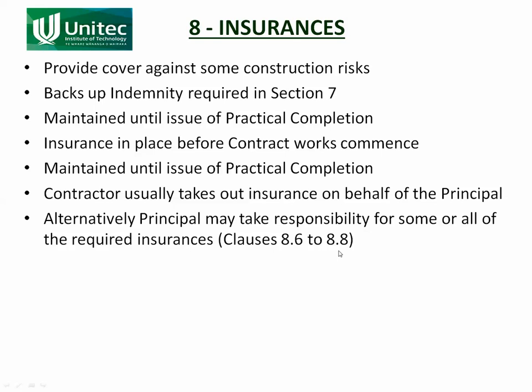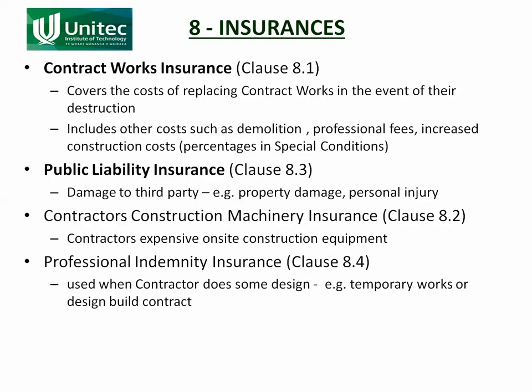NZS 3910 can be written so that the principal takes out the insurances. The first type of insurance typically in NZS 3910 is contract works insurance, covered by Clause 8.1. This is the cost of replacing the contract works if it's destroyed — so if it burns down halfway through the works, or if there's a storm, or something happens, the work can be rebuilt with the contract works insurance.